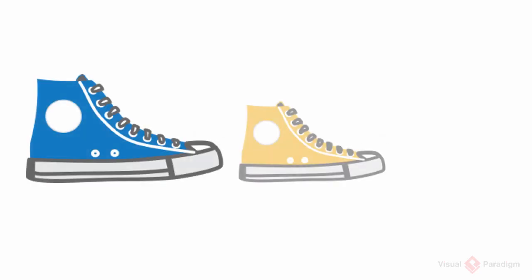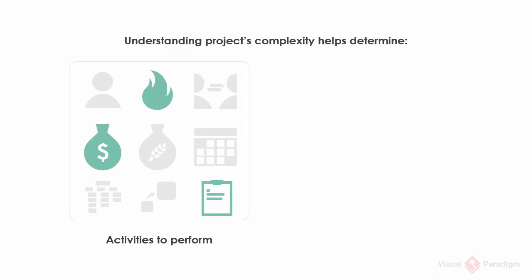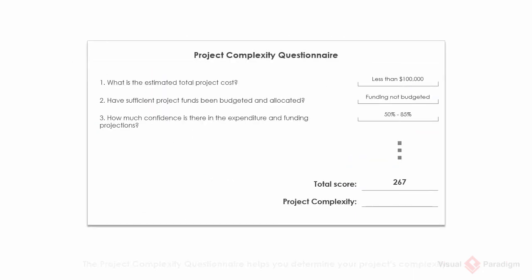Project complexity classification. There is no one-size-fits-all when it comes to project management. Having a clear understanding of your project's complexity helps determine what activities and deliverables are required for managing the project. The IT project management framework provides a project complexity questionnaire that helps you determine your project's complexity.